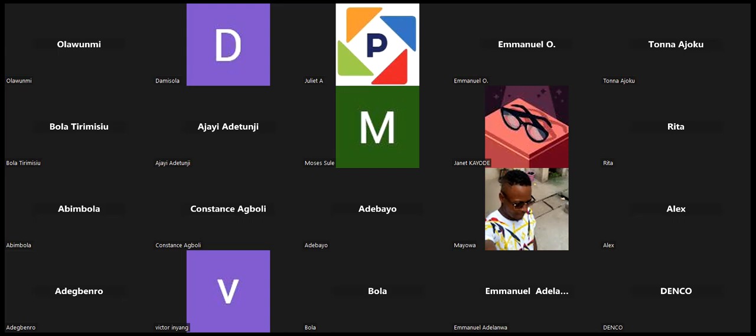So she asked for explanation, and then she went through all the tickets one after the other. Then when she finished, the ones that are similar, she grouped them. The reason for that is so that you don't have so much junk on your board, right? If three people say communication, you want to leave it standalone, especially if you've asked them and they mean the same thing. You can group them together, which was what she did. Then after that, they did a bit of voting just to vote on the things they want to carry over as improvement. Some teams can say they want to do voting on all. Here she just requested one or two major ones that they want to carry over. And after that, she assigned it to herself. That action plan they're going to do, she assigned it to herself.